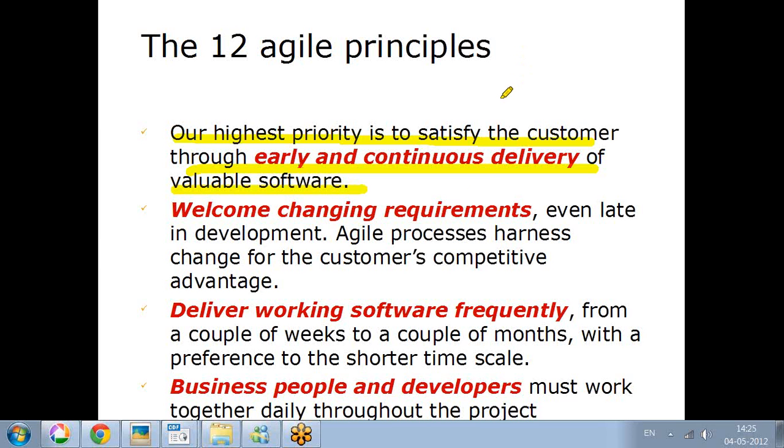So in Scrum especially, we are talking about 30 days delivery. Every 30 days we come out with a set of demonstrable features which is demonstrated to the customer, and either they can accept it, or if they have any further feedback on it, they can provide it. So this gives enough room for technology risk management as well as functional risk management.